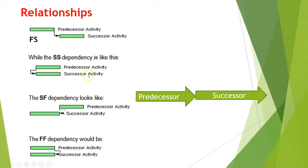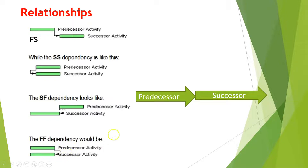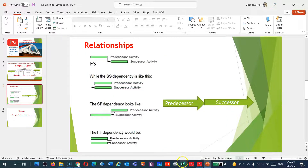Start to start means activities are happening concurrently — the successor activity's start is based on the predecessor activity's start. Start to finish means the predecessor activity's start is tied to the successor activity's finish. Finish to finish means both activities are tied at the end — the successor cannot finish unless the predecessor finishes. For example, you cannot finish concrete unless excavation is complete.